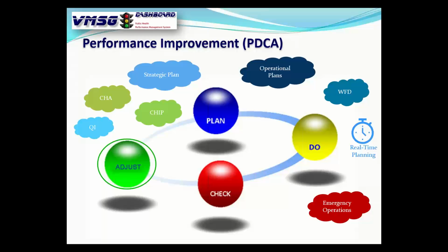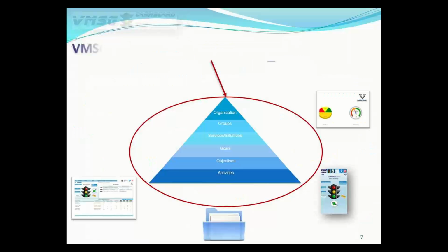Every plan is going through this cycle all the time. You determine what the cycle is, whether it's, sometimes it makes sense to do it weekly, sometimes monthly, quarterly, whatever you decide. But you'll just go in there by collecting this information, check, see how we're doing, make adjustments if necessary, keep it going. This is what keeps plans dynamic, which is critical. And it's actually a requirement of FAB to have dynamic plans as you're doing this in here.